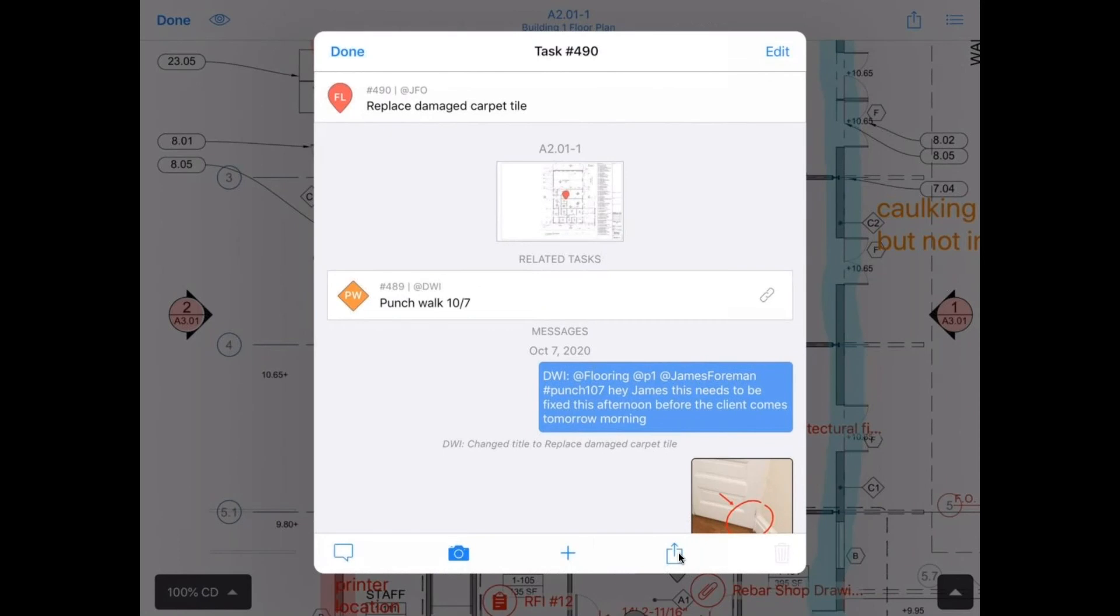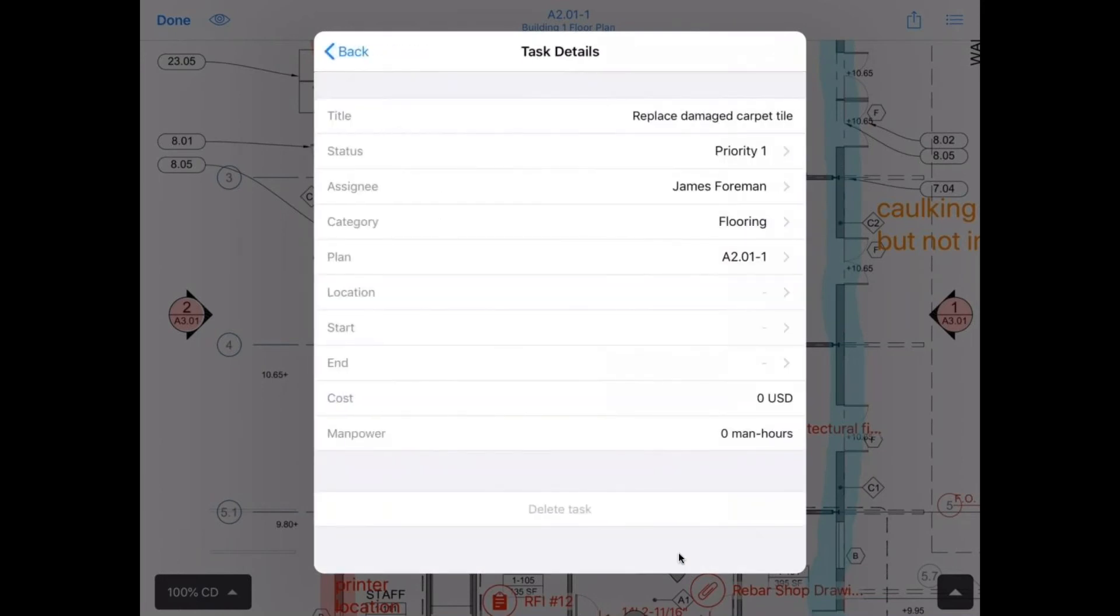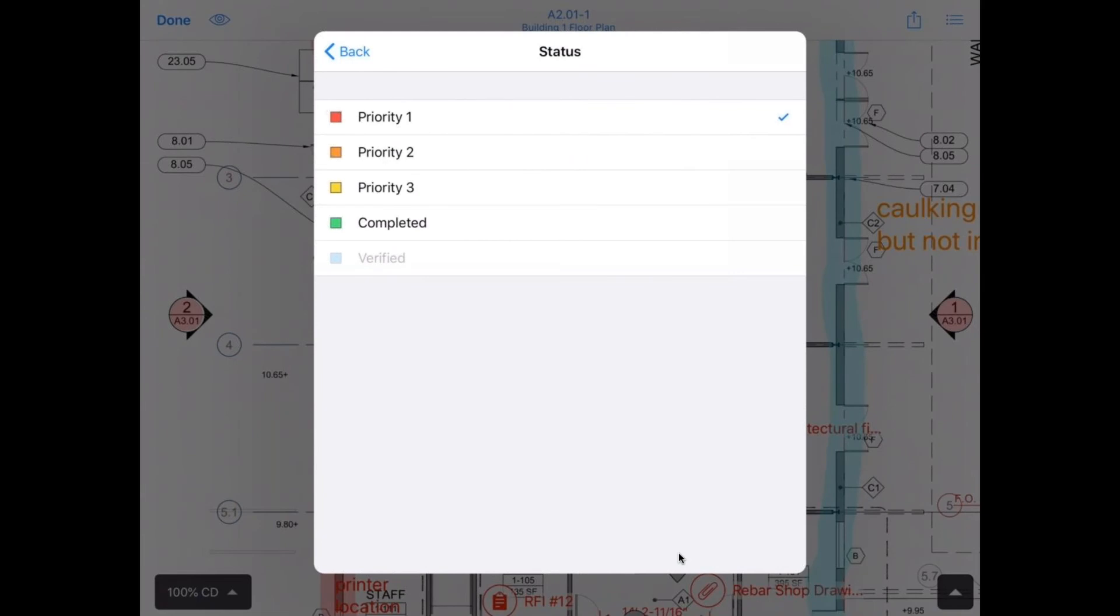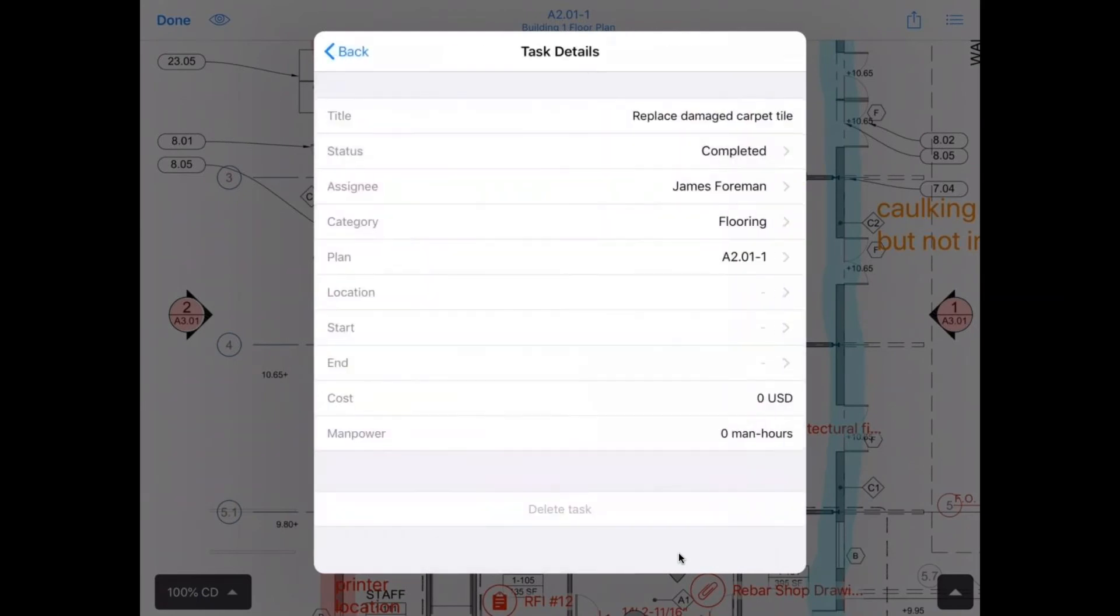And then once James has completed the task, he can either respond in the email if he's not on Fieldwire or he can come in and change that status to completed. You can see that verified is grayed out. That's because Dan is only a member and only admins can verify tasks. That's a really good way to get two sets of eyes on every piece of work and avoid a lot of rework in the future.